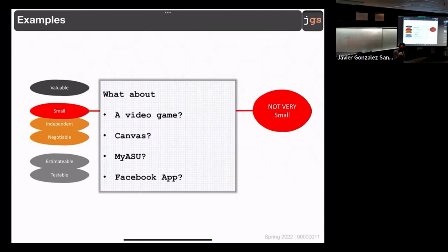An activity: the activities are the things that you're going to implement as part of the requirement, but that you're going to finish like today, tomorrow. It's the thing that you're going to be able to do in 1 hour. It's a condition, it's an instruction, it's calling a method. Activity, requirement. Good? Again, I am just doing an oversimplification of implementation and requirement things. It's not just that simple. We need to review that connection with details. But so far, at this point: instruction, activity, requirement, something that you work on for at least a couple of days. Good? Okay, so moving forward.